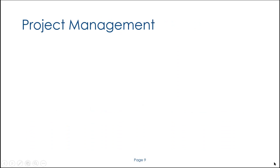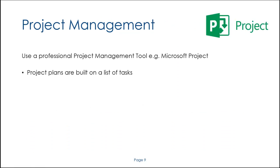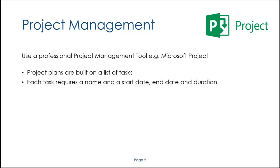I'll now describe a more sophisticated approach — the one that I use — which allows you to manage projects of all sizes: Microsoft Project. It's part of the Microsoft Office software suite alongside PowerPoint, Word, and Excel. It's a very sophisticated system but I use it even for small projects up to more complex ones. Project plans are built on a list of tasks, and each task requires a start date, end date, and duration. If you enter any two of those pieces of data, Microsoft Project calculates the third automatically.